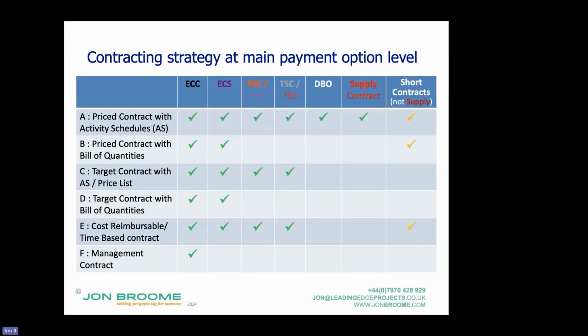Whereas for an activity, the contractor has to complete the activity to get paid. And therefore that puts an onus on the contractor to program in more detail at tender, to break their program down into at most month-long activities, and then during the contract an incentive to focus on achieving those on a monthly basis to get their cash flow.